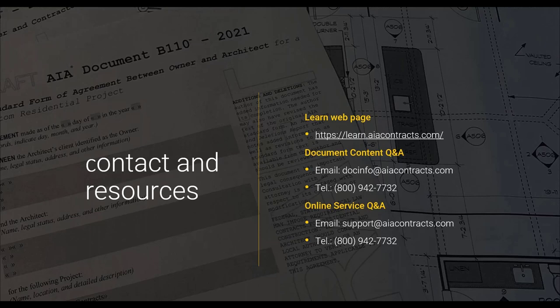A second question: are supplemental services anything that is not typically part of the architect's role? There are certain supplemental services, like programming, that an architect is typically qualified to do. There's a table of supplemental services — before signing the contract, you indicate whether you're doing them and how much you're being paid. Others include civil engineering services, which most architects think are probably best not under the architect's umbrella, but it's listed as a supplemental service the architect can agree to provide — that would be something not typically within the architect's role.